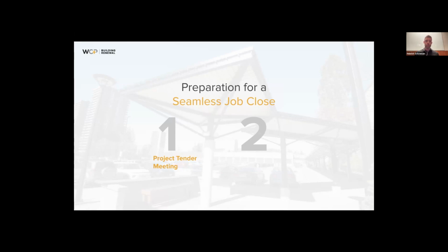This is that phase where you're bringing your stakeholders together, specifically your potential contractors, to a meeting on site to get aligned on a few key things: scope of work, project requirements. And you have this sort of think tank of all the key people that could be involved in the project to deal with any potential issues that maybe you're unaware of, right? So everybody comes together with that. You get aligned, you get clarity on all of those items, and you're set up for success.